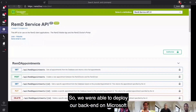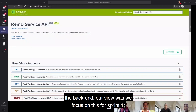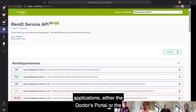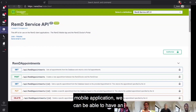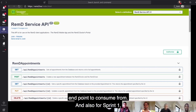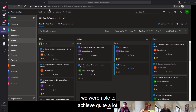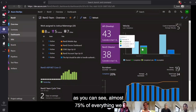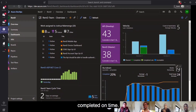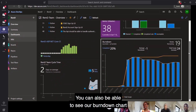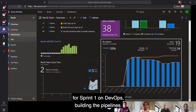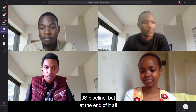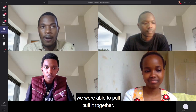We were able to deploy our backend on Microsoft Azure and come up with the documentation for the backend. That was the focus for Sprint 1, so that when building the other client applications — either the doctor's portal or the mobile application — we can have an endpoint to consume from. For Sprint 1, we were able to achieve quite a lot; almost 75% of everything we had planned for last week was completed on time. You can also see our burn down chart of all the development activities for Sprint 1 on DevOps. We had some challenge building the Vue.js pipeline, but at the end we were able to pull it together.